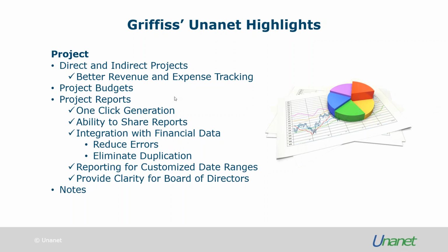So in addition to having an organization budget that you set up on the financial piece, every one of your projects can have a project budget, which is very helpful also because your project managers a lot of times will know more about the project that they're leading than your financial people. So if you create a project budget, you can actually use that project budget to help you create your organization budget for each year, and therefore eliminate some unforeseen expenses that might come through that you did not plan for.